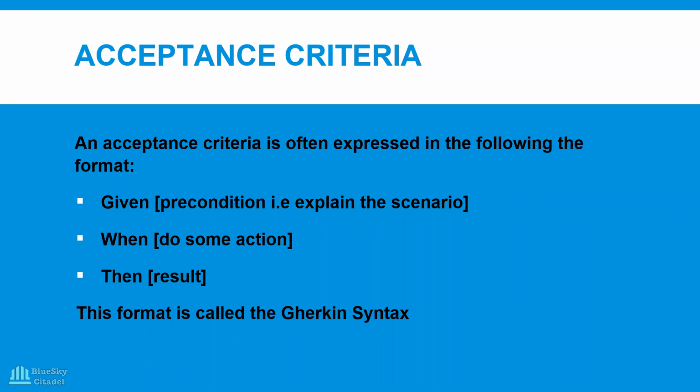You must start with given, but there are times where you will have given and when and then. I will explain further if the opportunity arises. Don't be too hung up on whether it is given, when, then, and, or given. Start with your given, because there has to be a scenario, a precondition, and then depending on how complex the story is.